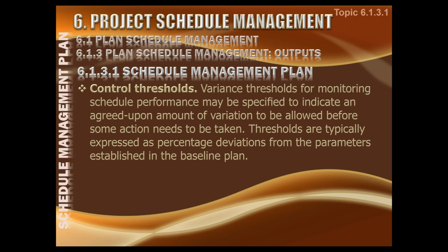Control thresholds: how much slippage of time is allowed, maybe in a positive or negative sense. Maybe your unit of measure is a day. You are measuring your activities in days. Then how much delay is okay with you? You say this is no problem. Is a 5 minute delay okay with you? Is a 10 minute delay okay with you? Is a 1 hour delay okay with you? So when it becomes painful for you, you say, oh, 1 hour delay is too much for me. Then probably 1 hour delay means that you are delayed by 1 day. You can consider that we have exceeded a day, and more than 1 hour means that we have entered into the next day, and therefore we are 1 day late.